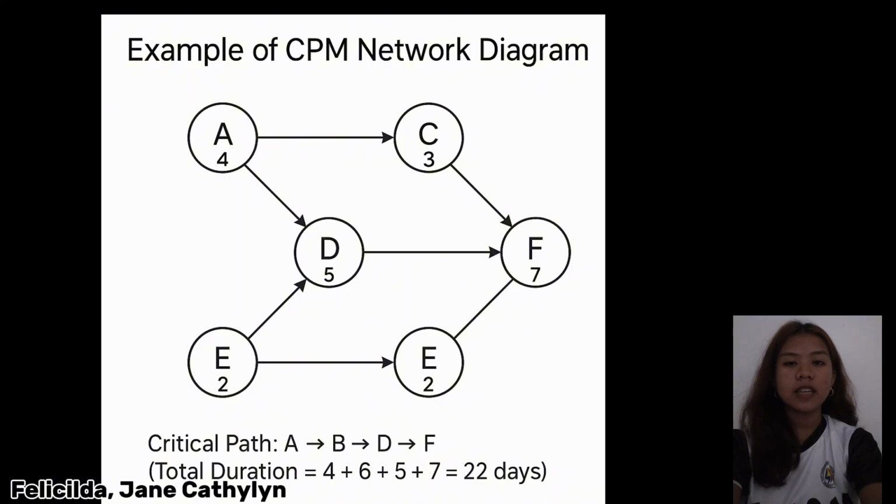Now let's look at an example. Building a garden shed. The project includes the following tasks. Design is allotted 2 days, buying material 1 day, lay foundation 2 days, frame 3 days, add roof 1 day, and paint 1 day. So these tasks form a straight sequence representing the critical path. The total duration is 10 days, and any delay in these steps will push back the project's completion.